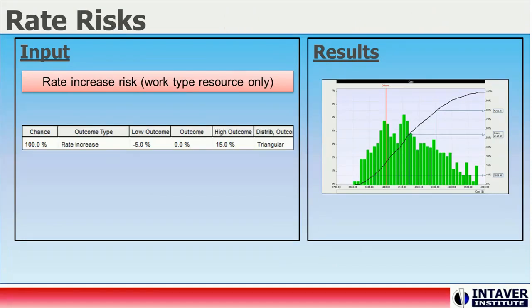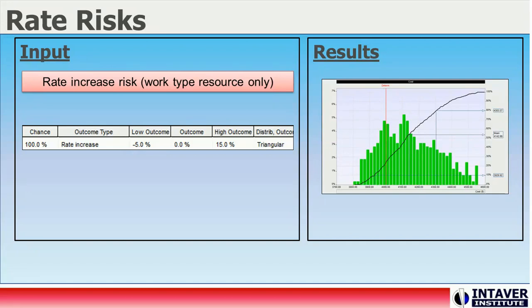Work-based risk can also be affected by non-schedule risks, called rate increase risks, where we can apply either relative or fixed impacts to the resource rate. In this way, you can account for uncertainty in labor rates. We can see the results of the rate uncertainty on the probable cost of the activity. Rate risks are assigned in the resource information dialogue box risk tab. Once the risk is assigned to the resource, it is applied or broadcasted to all of the activities to which the resource is assigned.